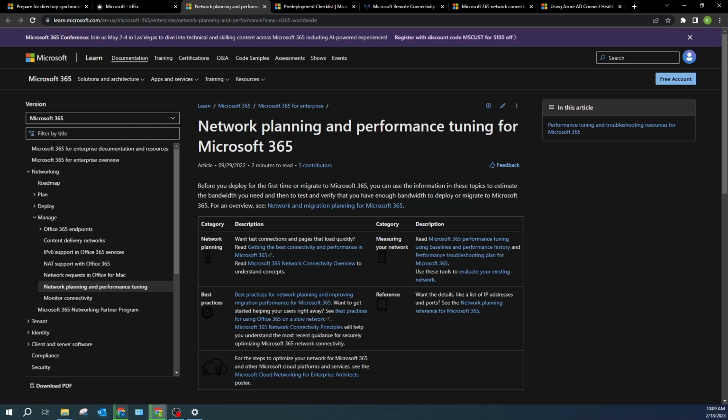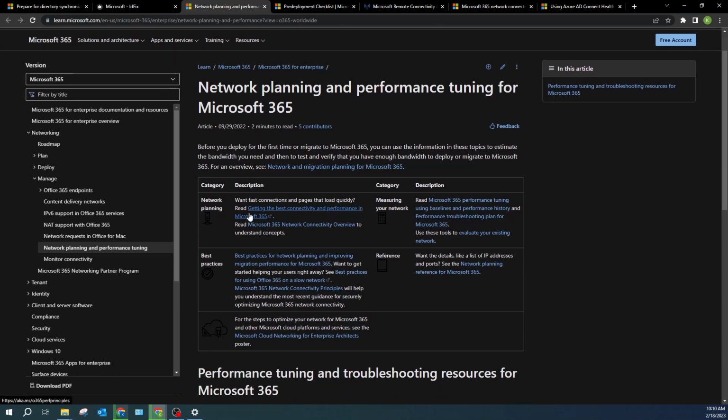Additionally, it also covers making key deployment decisions such as account creation and synchronization, data migration, integration with on-premises systems, and user device connectivity, fixing potential deployment blockers, preparing the environment and organization, testing the deployment, rolling out to the users, and final steps like migrating DNS settings and informing users when they can start using Microsoft 365 are also included in the checklist. This table serves as a sample deployment planning checklist. It can be used as a template and customized to match business requirements.